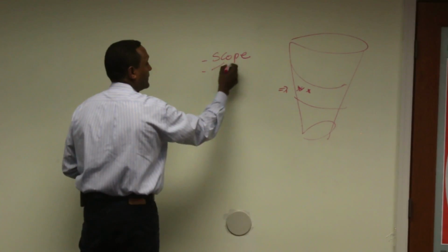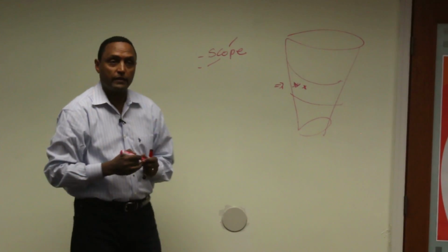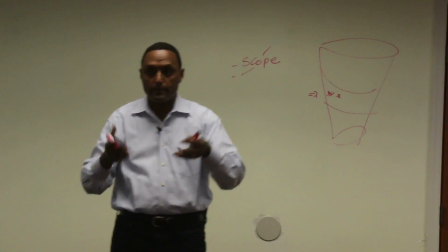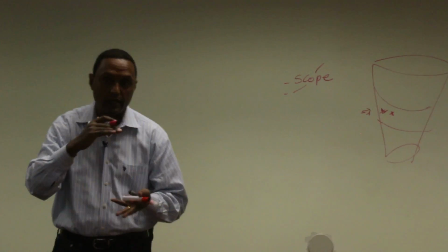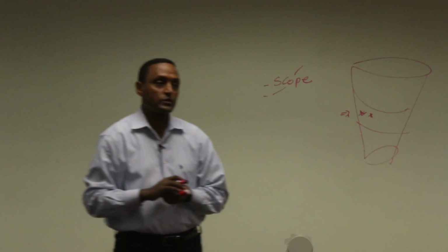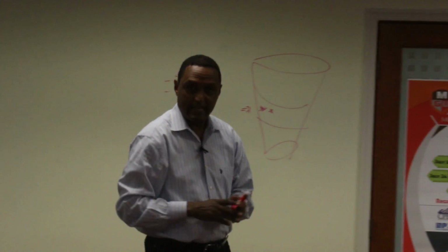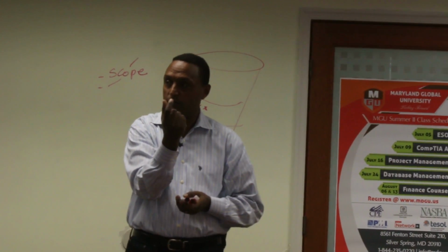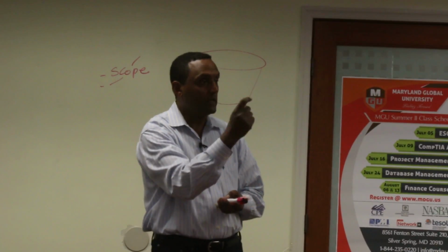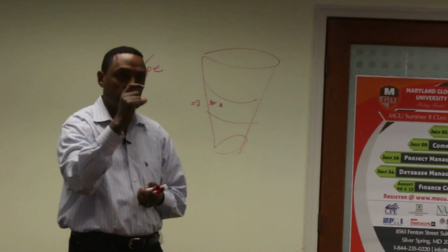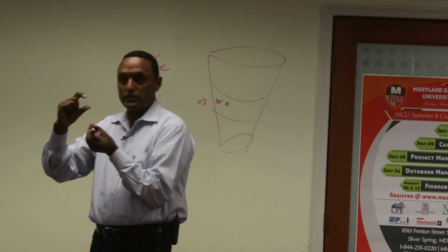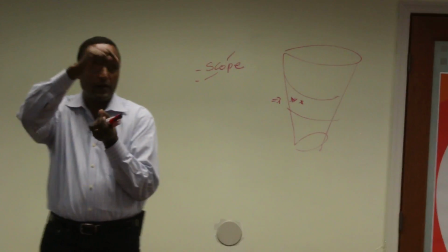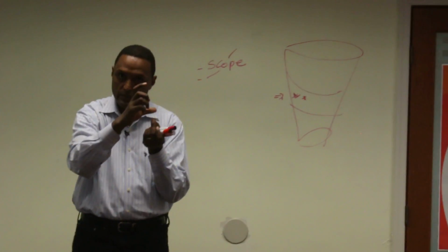and in the scope we identified the high level requirements, and we broke it down into manageable chunks, and we produced a scope statement. And then we took that scope statement and we built the work breakdown structure. And in that work breakdown structure, we hierarchically sequenced the activities.